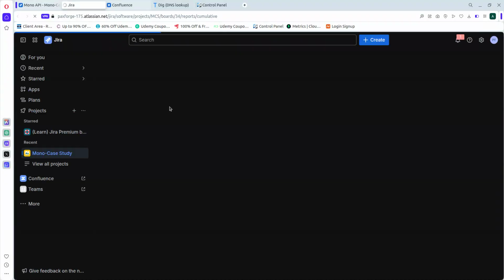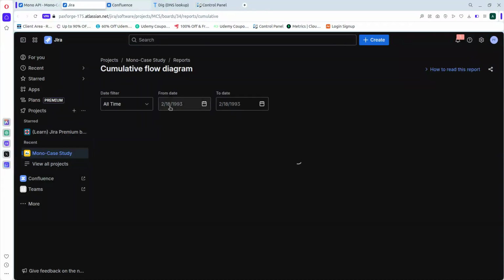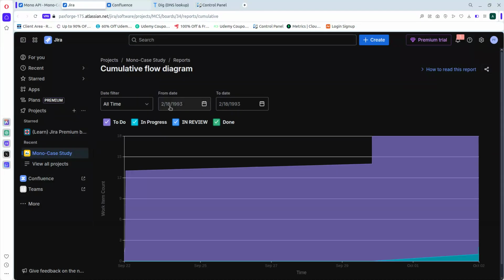Sometimes the team moves as they should, and when they finish a job, a task, an issue or a story, they know that they can't mark the job as complete themselves until it has been reviewed. The essence of that is so that there won't be a back and forth. Now imagine marking a project as done, and after marking it as done, you might still need to work on it. The fact that you are still working on a project that has already been marked as done, you need to move it back to in progress again.